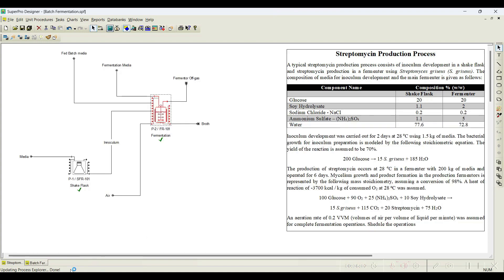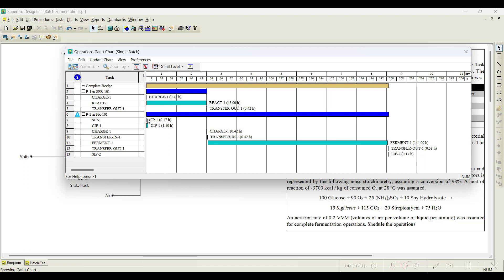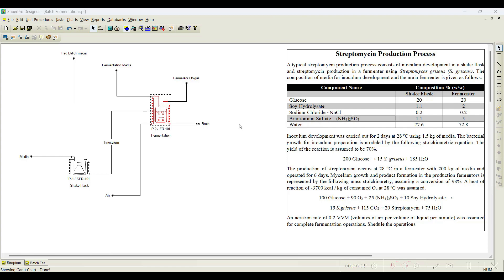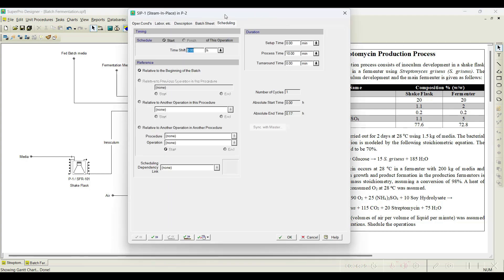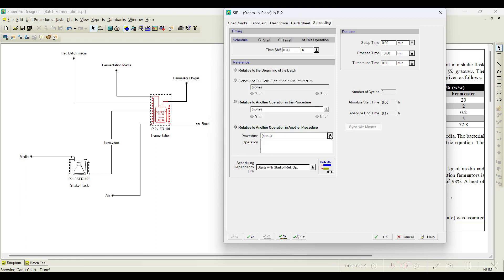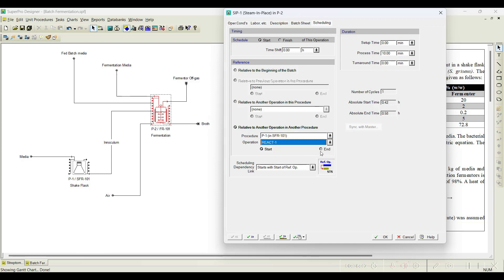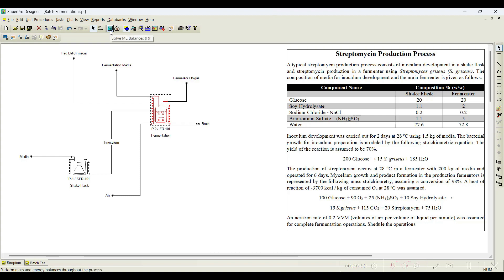You can notice we just added the cleaning procedures. If you go to the Gantt charts, there will be a scheduling issue because we have not initiated the timing correctly — it is starting from time t=0. Go to steam in place, go to scheduling, and set when the steaming should start relative to the previous procedure. Once the react operation in the shake flask reactor is completed, we start preparing this fermentation system — so I will relate it to the end of the react operation. Click OK; the remaining operations will follow according to the previous operation in the same procedure. Run it and go back to the operation Gantt charts.